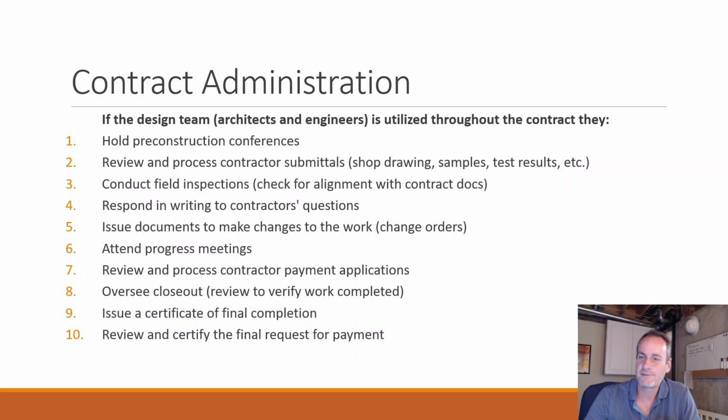and you can read all this. But they can also make sure that the work was done the way it's supposed to be done before they can say, okay, you did do everything according to what the original design was. If I'm the one who designed the project, I would be the one to say it was built the way it was designed. Therefore, you can get paid, right? So all of that can be done by the design team if they are utilized throughout.